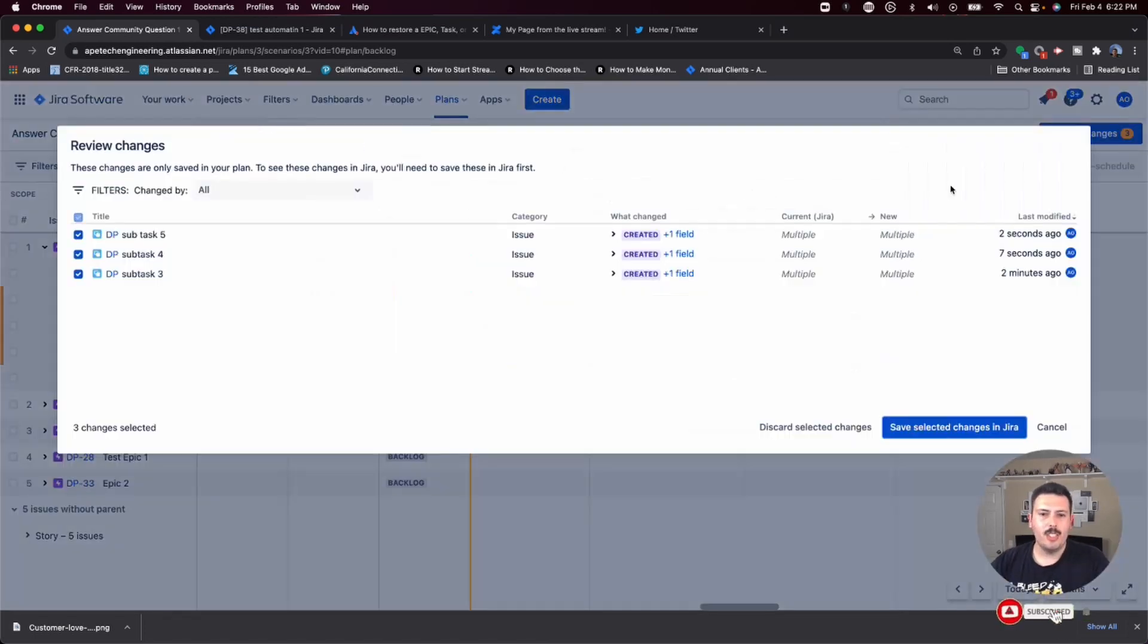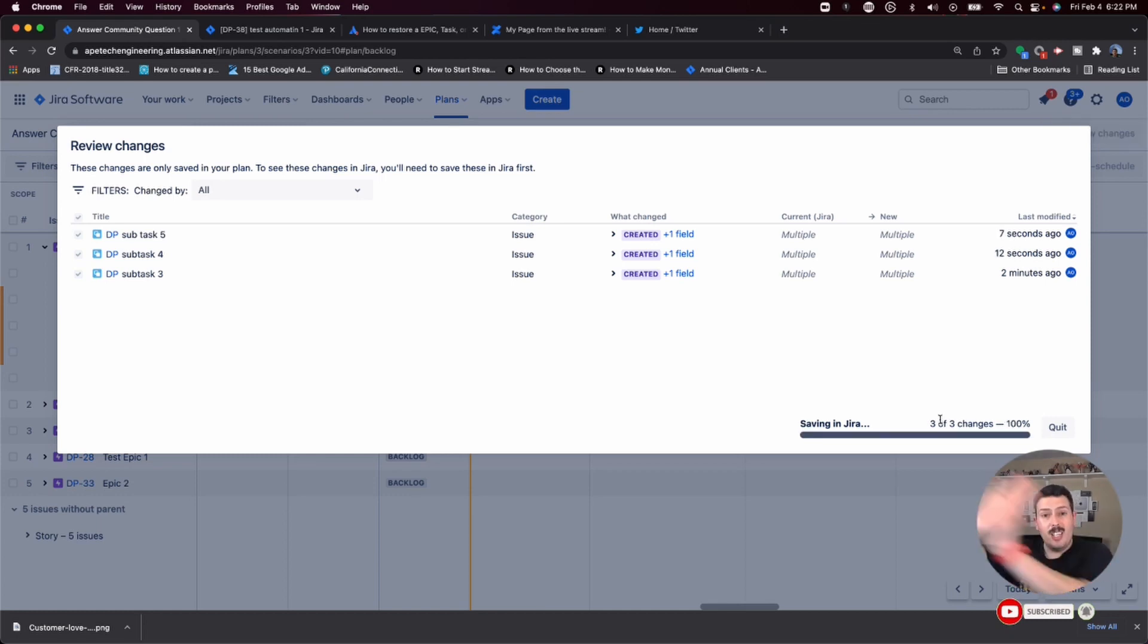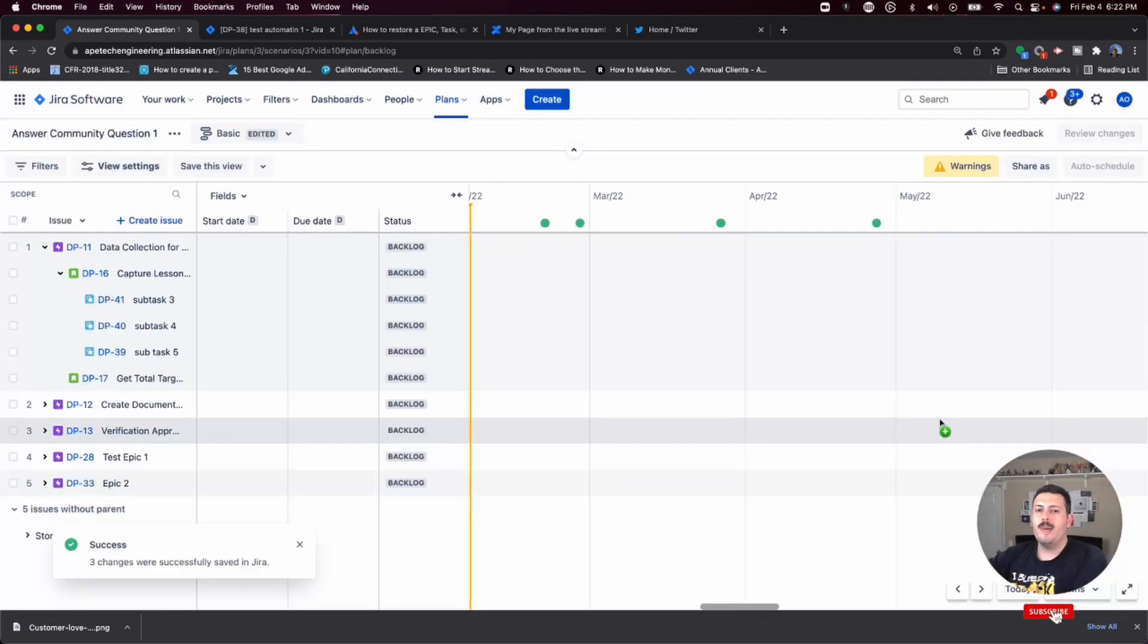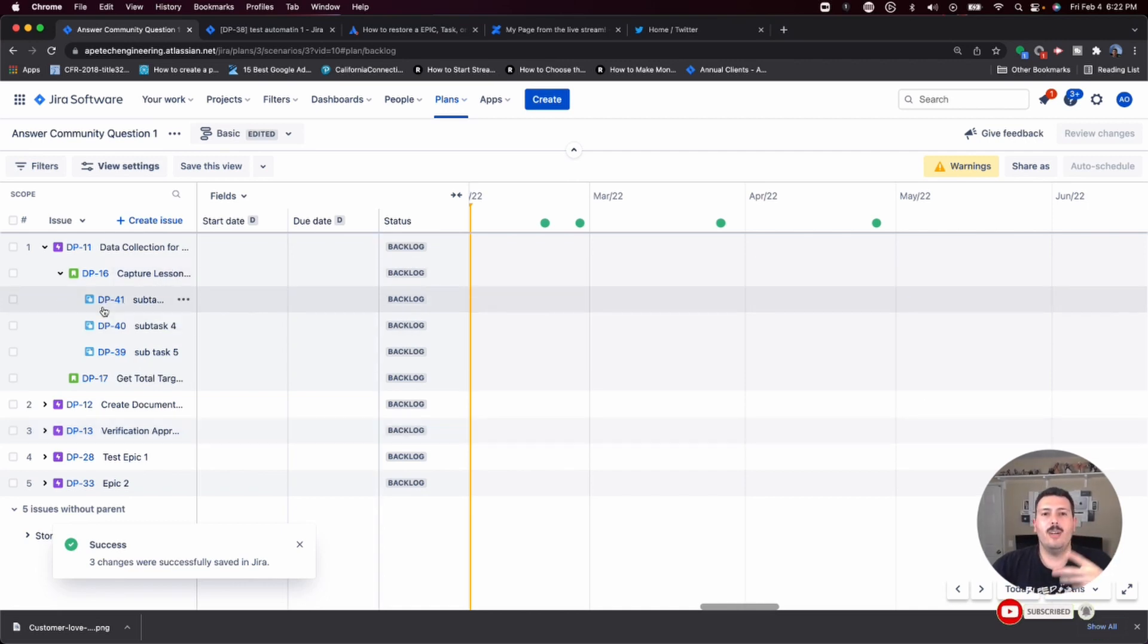And I'm going to hit review changes. And what this is going to do, this is actually going to take my issues that are in my plan. And it's actually going to push them to Jira because when you're in the plan until they have an actual number, they don't actually exist in Jira yet.